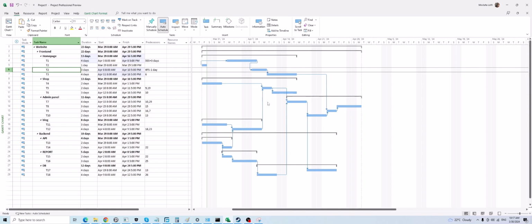So these dependencies inside of the Microsoft project are tools that you can use to implement the logical dependencies between tasks of your project. But it can be logical dependencies between tasks, or it can be just a decision. Okay, you may say, based on my consultation with some experts, we decided to wait for 1 week. That's fine. You define it and you implement it inside of the Microsoft project. As long as it's clear, you can implement it. That's fine. You have enough tools here.